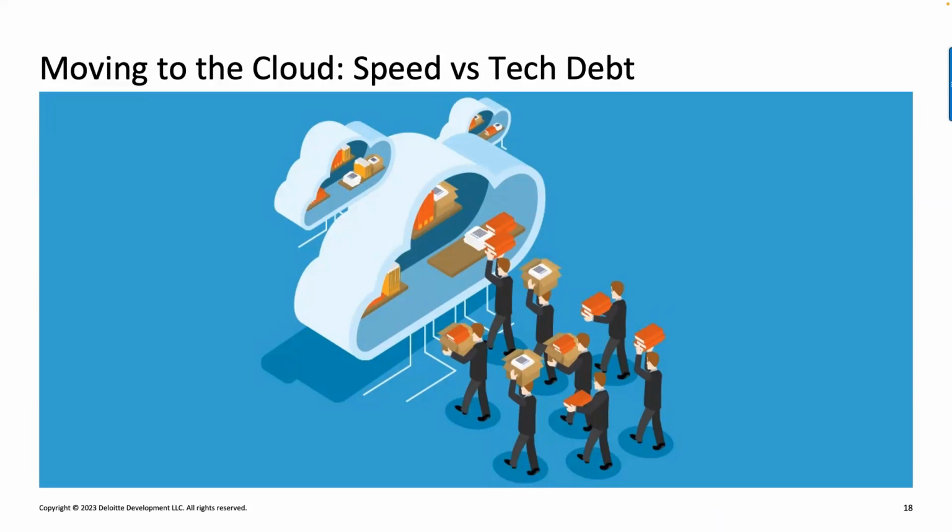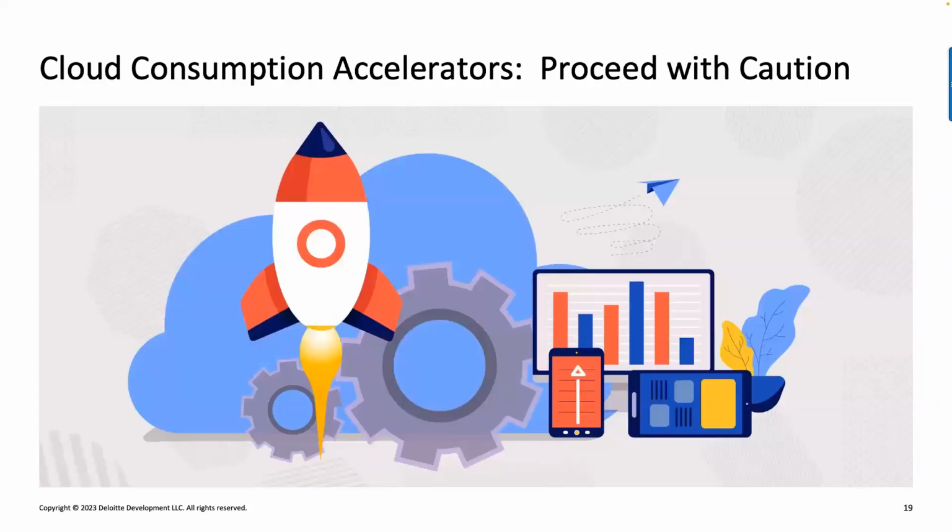So tech debt is extremely dangerous. And if you don't have the right guidelines, it can kill your project. So you need to provide some guidelines all the way down. It says, yeah, here's what we are going to handle as part of tech debt, prioritize it, and then slowly go and do it. If you have all the money and the timeline, which I don't think lots of people have, right? Go ahead and eliminate it. But that is kind of something we don't see. We see incremental type of things that you go to fixing the tech debt.